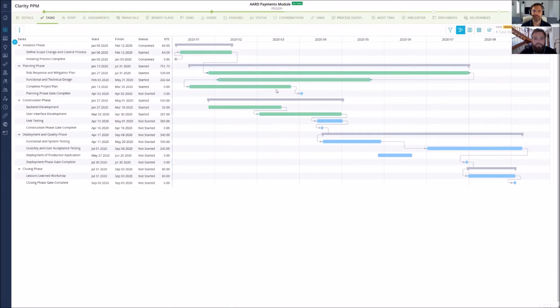So I just popped up a very classical Gantt chart-like element where you see the different tasks that you have and which state they are in. And also you see here ETC, the estimate time to completion. So from a project manager perspective, you will see this information very handy in an overview. And also here the advantage of an integrated system, because every good PPM system should provide you with the possibility to also record the timesheets, so that these things come back to the system, and based on that, calculations are done automatically. The same is for assignments, financials, and all of that stuff.